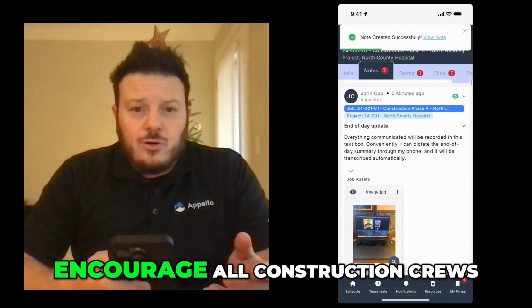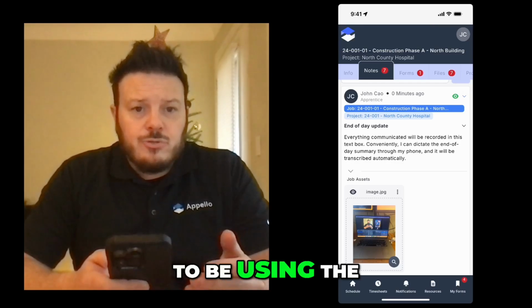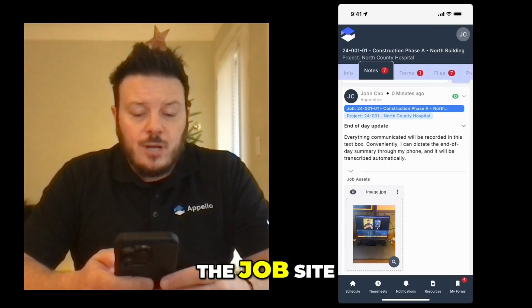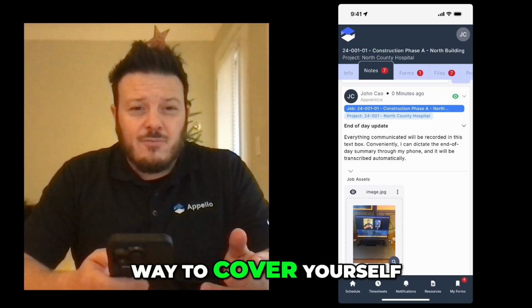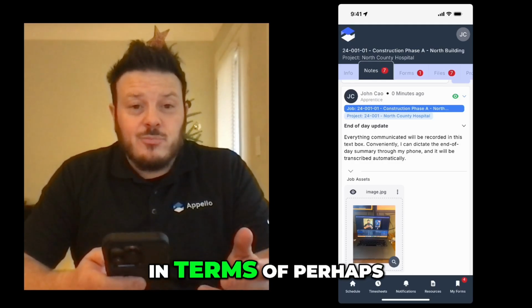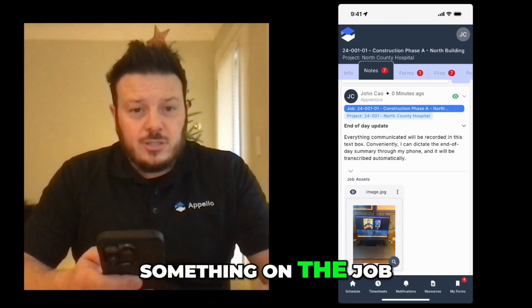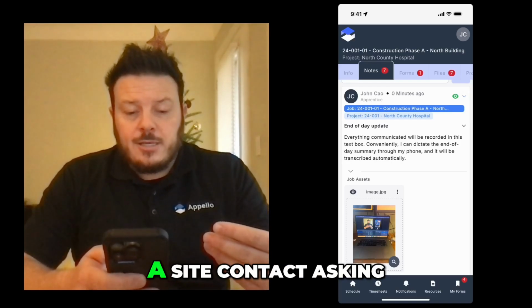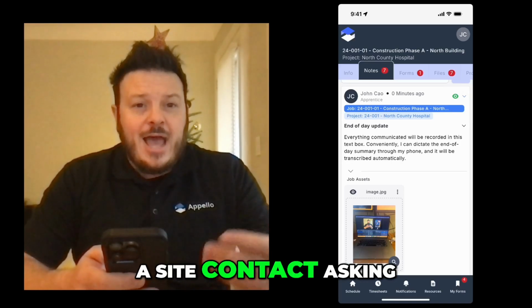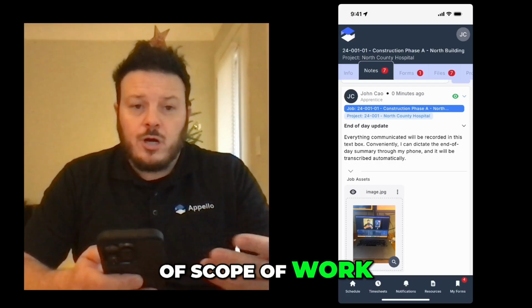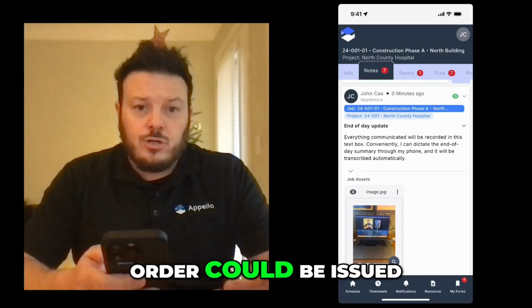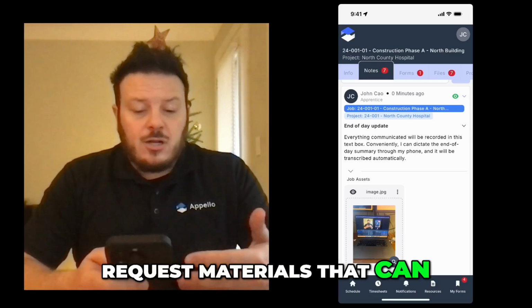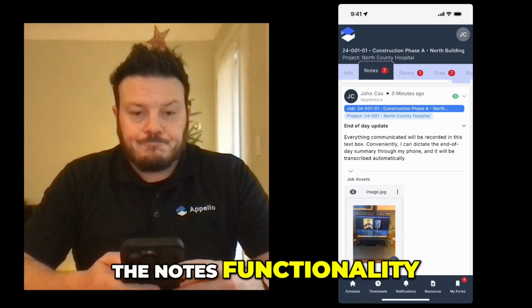So I would highly encourage all construction crews to be using the notes functionality. It's a great way to stay on the same page as to what's going on at the job site. It's also a great way to cover yourself in terms of perhaps being told to do something on the job site by the customer, or a site contact asking you to do work that maybe is outside of scope of work. Maybe you want to document so a change order could be issued. Maybe you want to ask questions, request materials. That can all be done through the notes functionality.